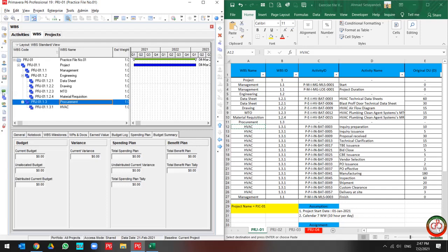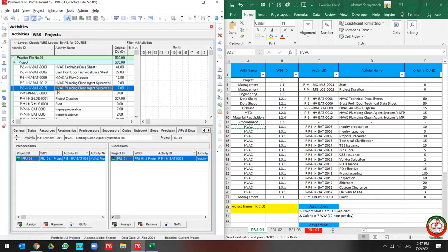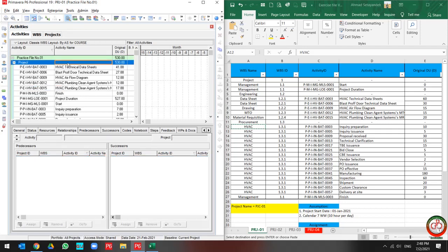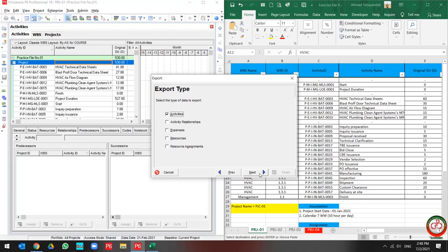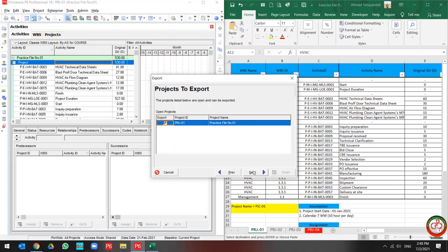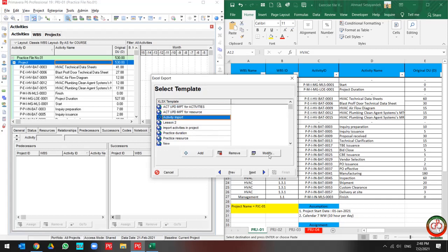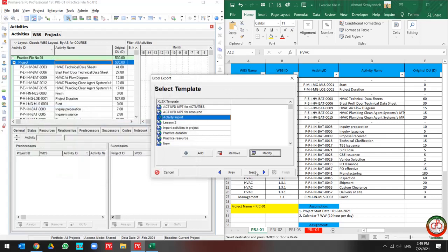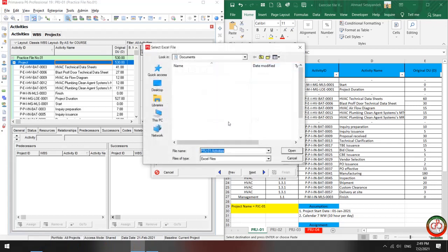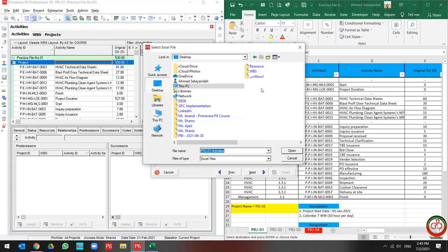I create my WBS. So I should come back to the activity section and create an export from my project. I go to File, Export, by spreadsheet, for activities only, toggle on export. For the activity import, I only select WBS name, activity name, WBS code, activity name, activity status, NWS, and activity ID. Do not export more information than this because it's the database and you may face problems.